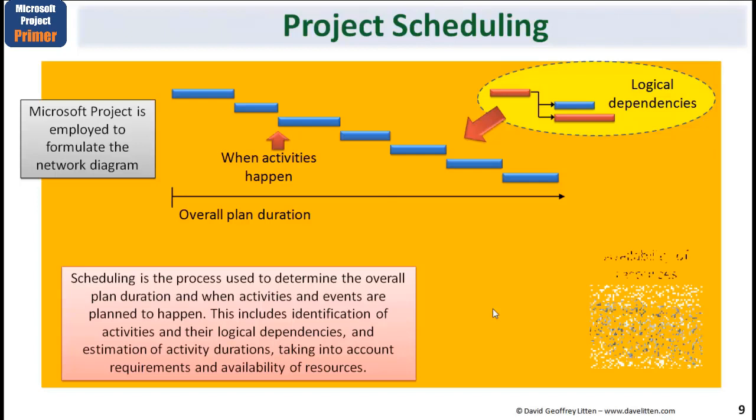Now this is an important point, you see. It's all very well saying you need these tasks done here, in this sequence, in this timing, but you need resources to carry out the work. And depending on the availability of such resources, you may find you need to move such tasks in time to allow for when such resources are actually available.